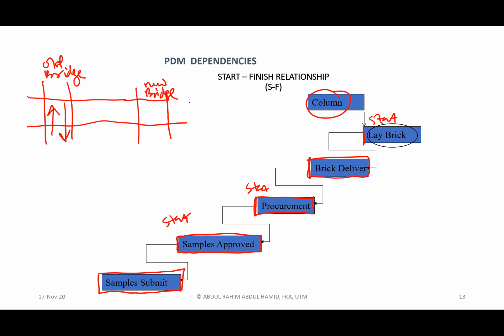With regard to the demolition, let's say demolition is considered as an activity. When can we start to demolish the old bridge? Exactly when? For sure, when the new bridge is basically completed. When the construction of the new bridge is completed.